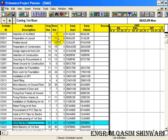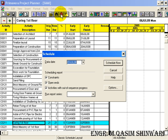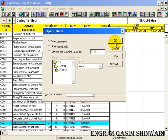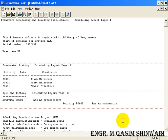Now I am going to schedule it. For scheduling, either click on the Schedule icon, go to Tools > Schedule, or press the F9 key on your keyboard. Schedule the project — the started schedule is now shown on screen.